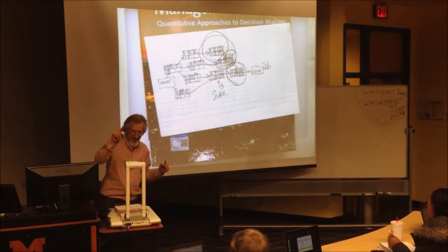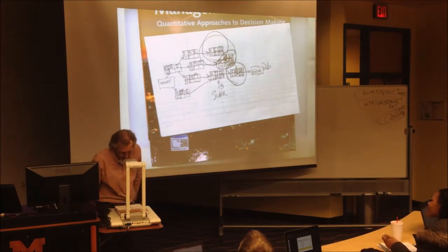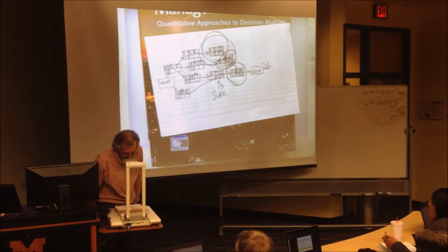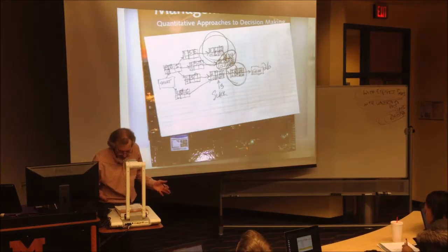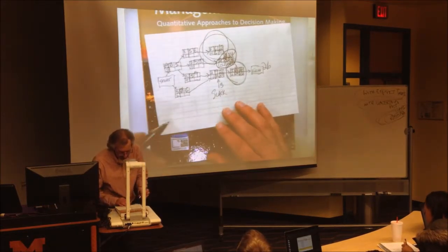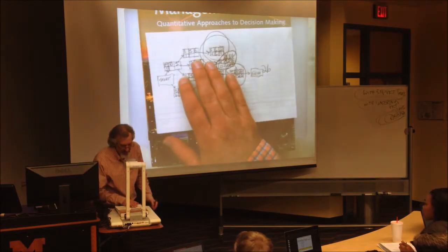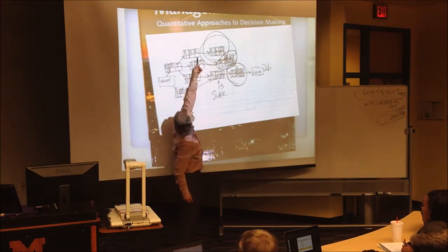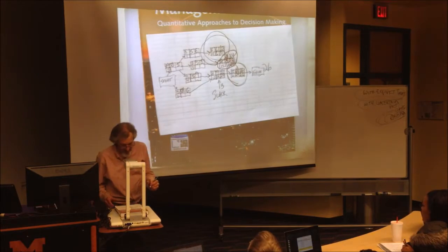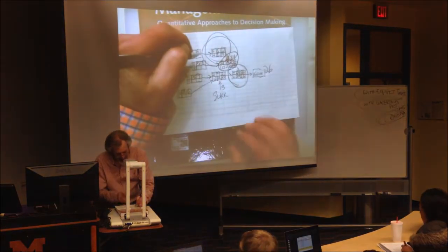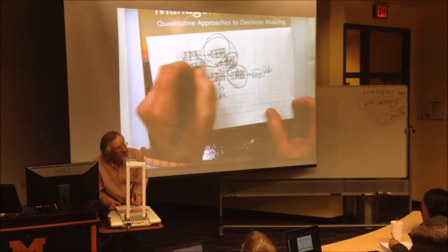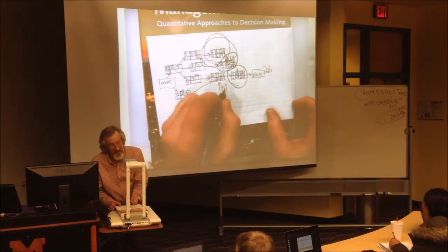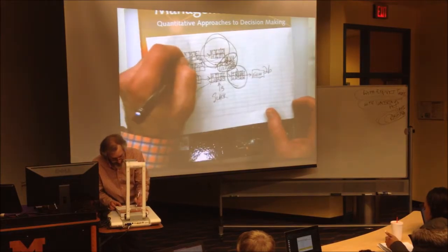Which one has more than one activity after it? A. That's the only one. We have to wait till A. Let's keep going. Okay, let's do E. You guys tell me, what's the latest finish for E? 6 it is, because F is the only one after it. The latest start transfers to the latest finish of the previous activity. Subtract 1, 5, we just identified.